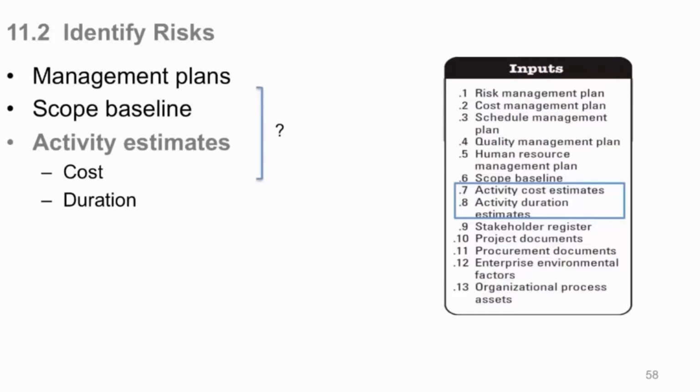But yet there's risk in there because they are estimates, even though you locked it in, and they're estimates until a certain time, right? When do they become actuals? When you actually spend the money, when you actually take the time, whether it's that exact time or more or less, whether it costs that much, more or less. But at some point, you'll be done with that item. You know exactly what it cost, exactly how long it took. But at that point in the game, game over. No risk. You can't plan for risk. You've already done it. If you're late, if it costs more, too late. So you need to do this in advance. And by the way, this bracketed scope, baseline, and estimates of cost and duration, remember what that is? Yeah? Triple constraint. So we're managing risk primarily with your triple constraint stuff, among many other things.